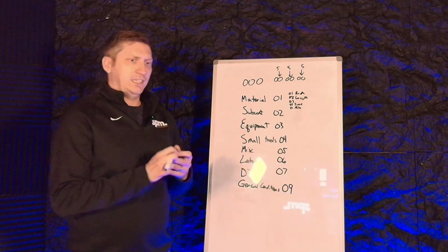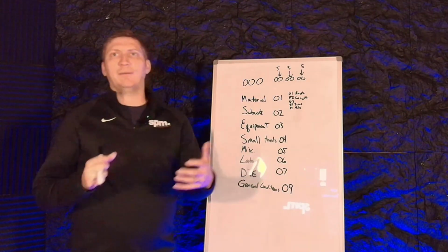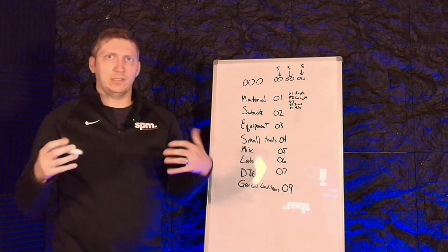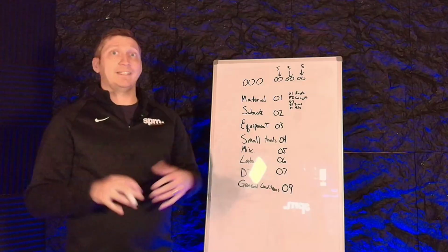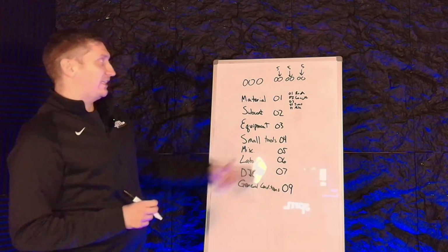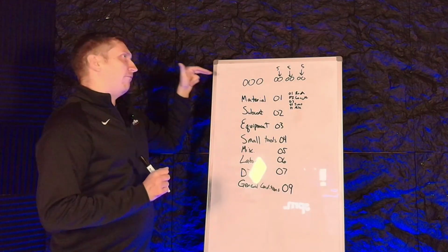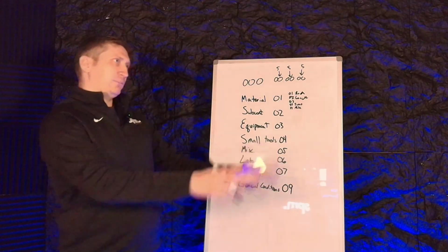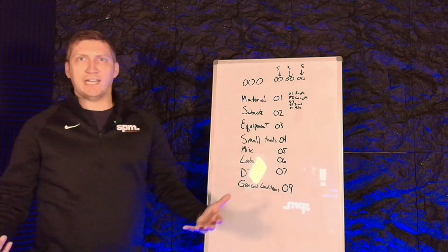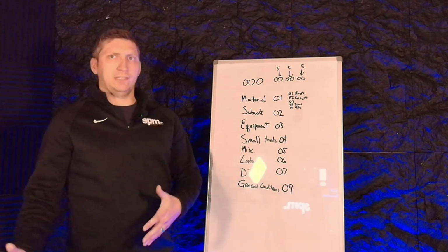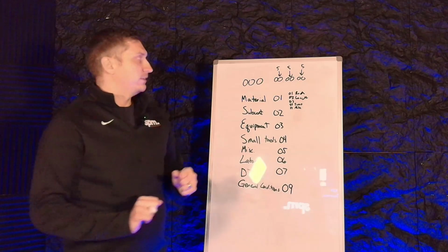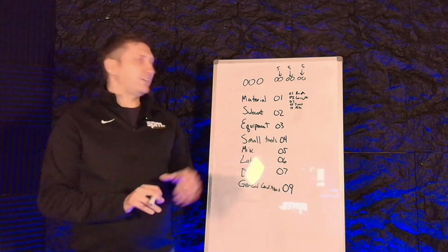Think of it like this. If the superintendent on the job has to meet with your accounting team and bookkeeping team to actually break this down to get to, well, how much 57 stone did we use for phase A in this parking lot for this parking stall? Yes, you can do that. But is it worth their time to do that? No. So what we really care about is think of it as like a lump sum.